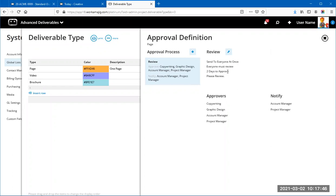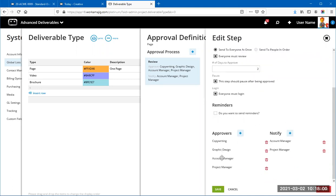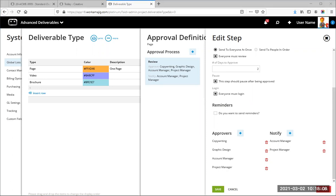Editing the approval process for Pages: there's one step, it's set to 'Send Everyone at Once,' everyone must review, two days to approve, and the approver and notify lists are pre-built. Under the step's edit settings: 'Send to Everyone at Once' means all approvers get an email simultaneously. If you choose 'Send to People in Order,' the deliverable goes to the first person, and once they decide, it goes to the next person.